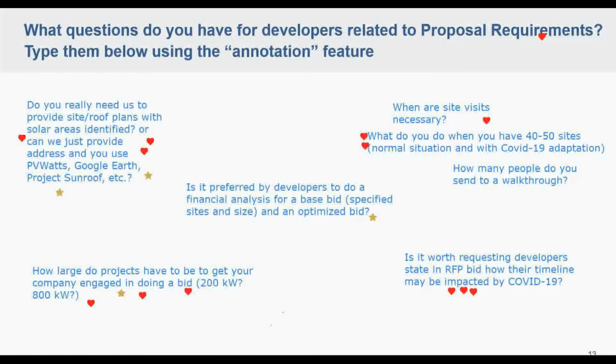Yeah, and just following up on that, the other documents that if a client has, we always like to include in an RFP are any ALTA surveys that show the area as well as setbacks and any easements, structural as-builts, electrical one-line diagrams. So the more the merrier in terms of any information that can be provided.